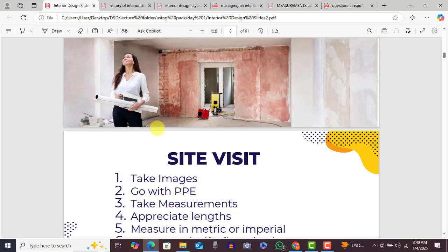Draw the floor plan yourself and take all the measurements, because it's different. Trust me, when you take it, it's different from what is on the plan, on the ground. Take some pictures. Do you get me? As for the floor plan, you can't trust the blueprint you are given. Forget about it. You draw your own floor plan and then you assign the measurements to it.